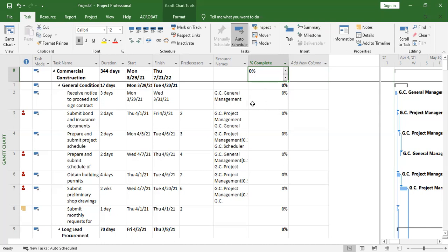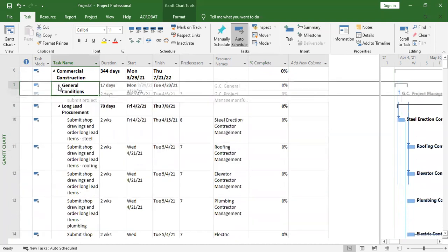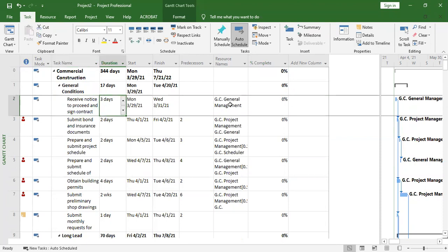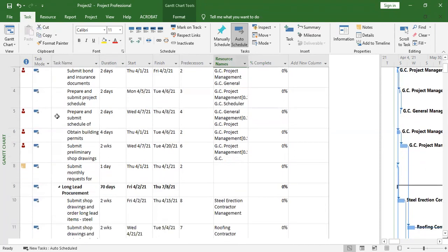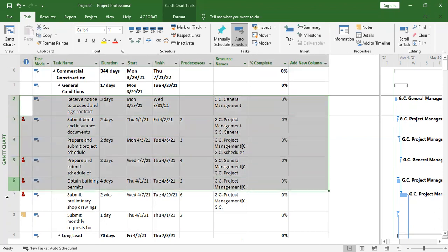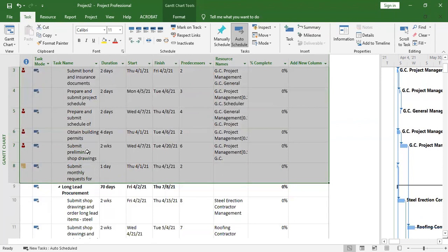When we input, we only put it on tasks. We don't put it on the summary levels or the full project, only on the tasks. For example, if I forgot to mark progress for some activities when we completed them, you can select all these completed ones, up to here. Then I come to these different bars: 0%, 25, 50, 75, and 100. So I can say those ones are 100% complete.